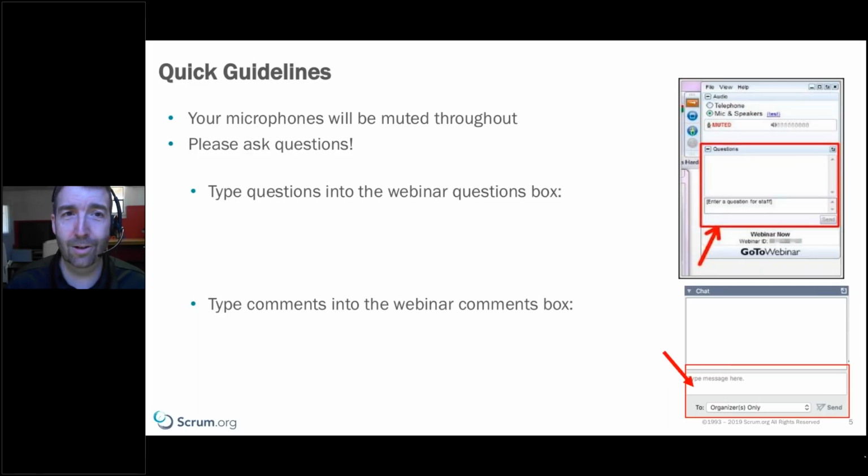uncovered in sprint planning are going to come out during the sprint, or worst of all would be after the solution is in production. But backing up from that, you might learn in the sprint review, and you want to learn that as early as possible. So there's a real good reason that investment in time pays off in sprint planning.